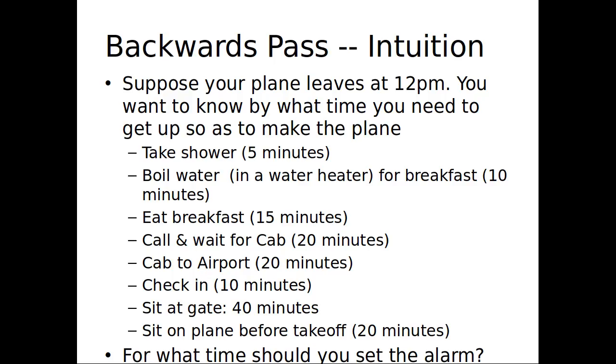And the key reasoning when it comes to parallel activities is, if I need to call a cab at 10:10, or I need to start eating breakfast by 10:15, then I'm going to need to start boiling water 10 minutes before the earlier of those.